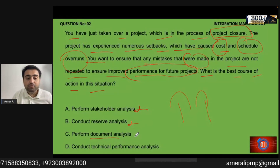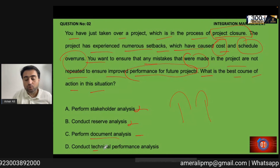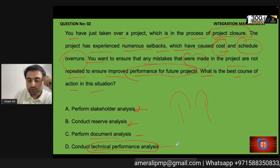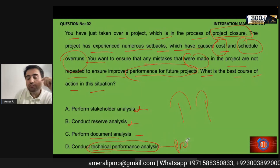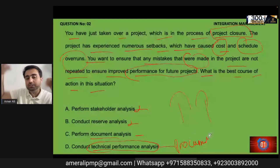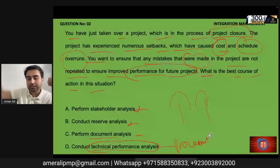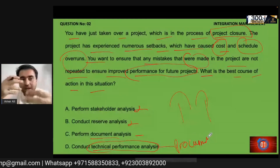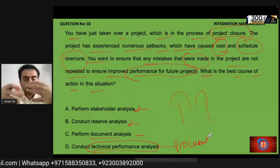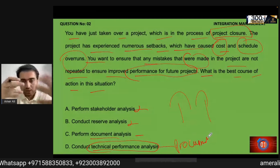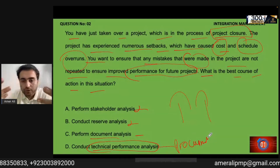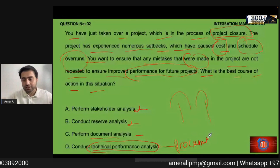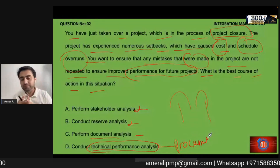Technical performance analysis is a tool used in procurement to see how much work has been done. Document analysis is the tool we use when looking at lessons learned — we look at all reports and documents to improve future projects. That is how we write lessons learned and daily reports. Document analysis is the correct answer.